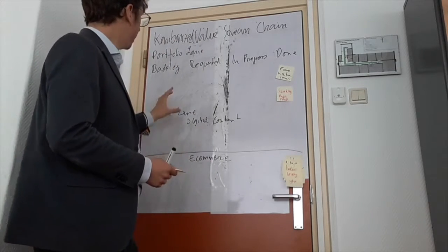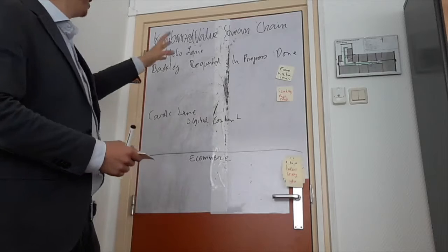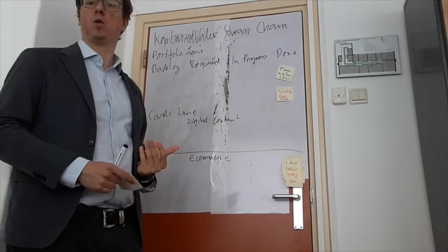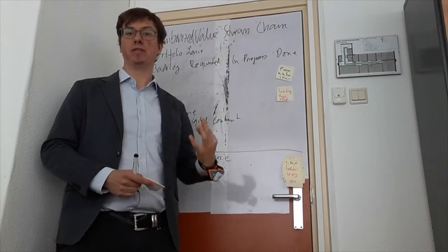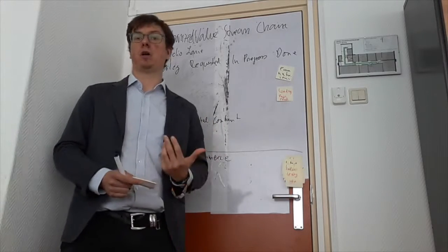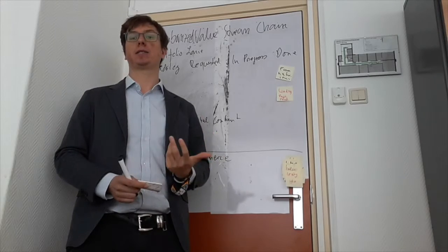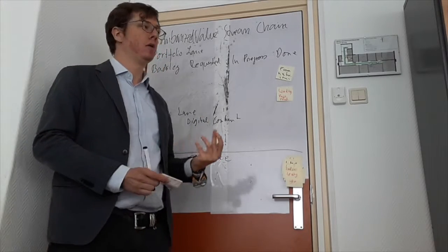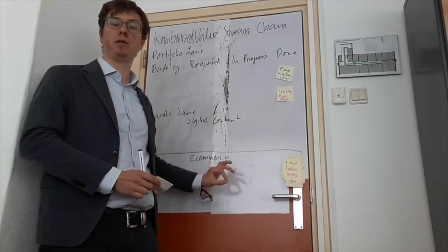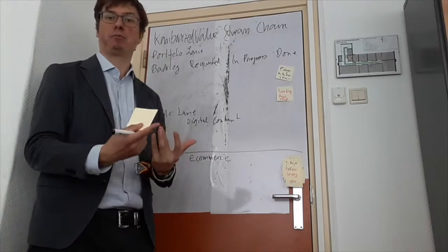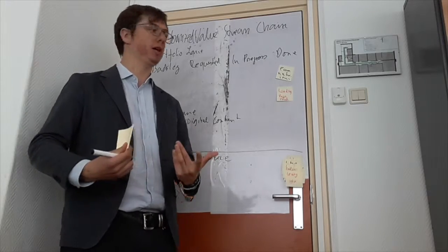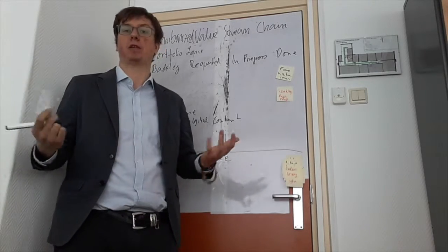And by visualizing this with a Kanbanized value stream chain, we always know what task every member of the team is working on right now. We always know which tasks are the most urgent tasks right now, and which tasks I have to work on next. And when there's a bottleneck somewhere, because some task is blocked by another one, we can jump in there and help that person finish off that bottleneck before we are doing something else which is not actually creating any value.